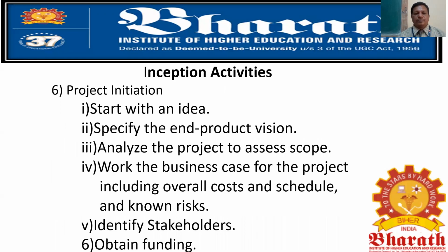So the project initiation can start with an idea, specify the end product vision, analyze the project to assess the scope, and work out the business case for the project, including overall cost and schedule, and also the known risks. It identifies stakeholders. Stakeholders are customers. If you are developing a product on your own, we can say that this product can be suitable for which type of customer. That is identifying the stakeholders. A particular product is meant for which type of stakeholders, that we have to identify.